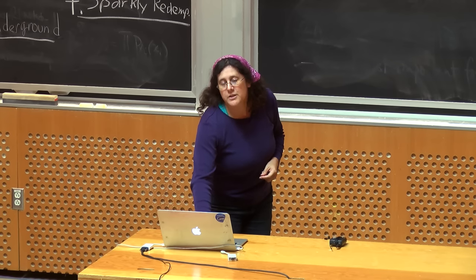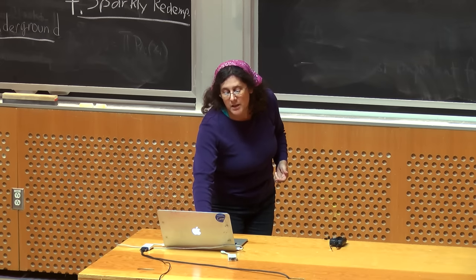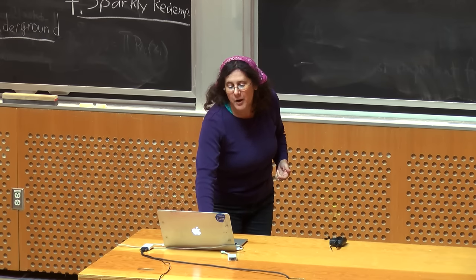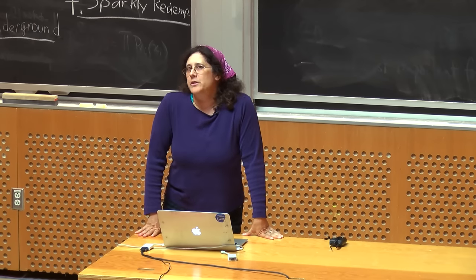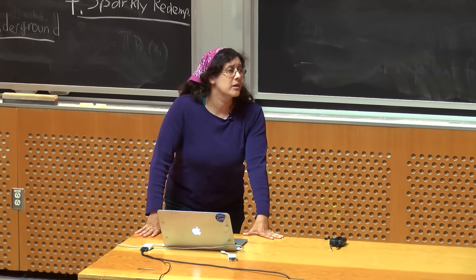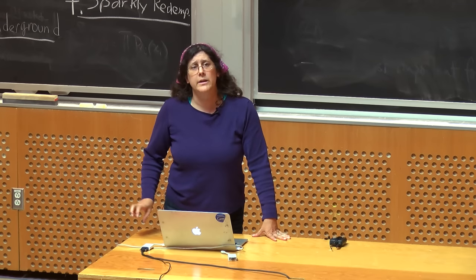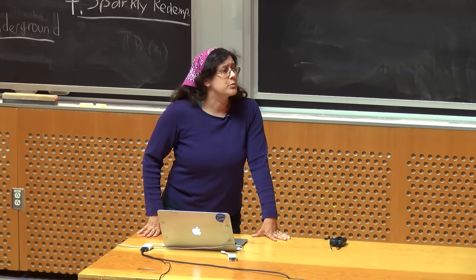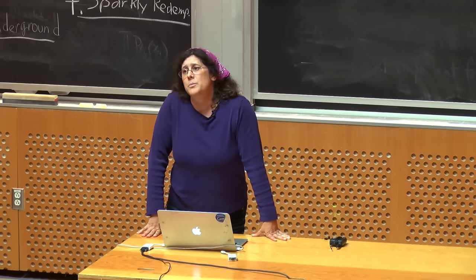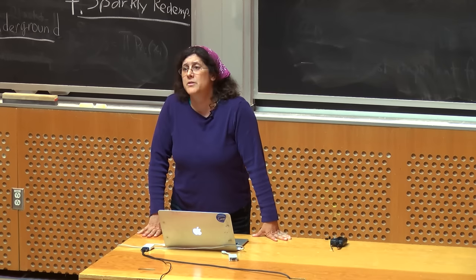Time boxing acknowledges that there's a maximum amount of time you can spend on any particular problem before any time after that is wasted. It does mean that you won't always reach the perfect solution. If you've given yourself an hour to discuss a problem and you've talked about it for an hour and you haven't quite come to a great solution, you stop talking anyway. You decide what the most reasonable solution you've talked about is, and you go ahead and do that. It's an implementation of the theory that the perfect is the enemy of the good.